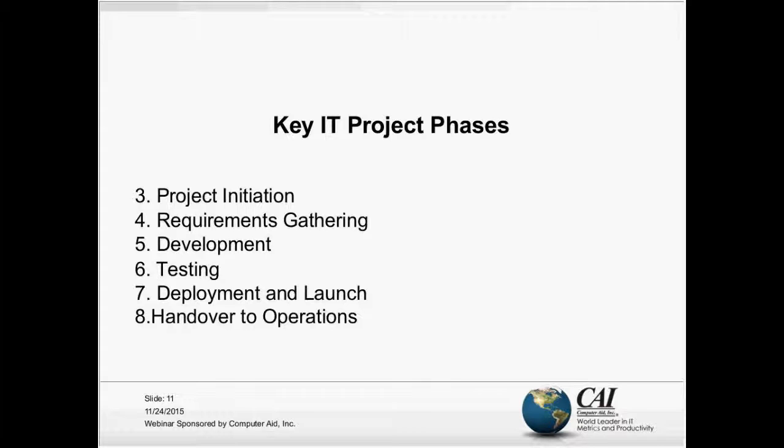This is basically where you've been given the go-ahead to actually deploy the software and actually launch it. And this in itself, if it's a really big program, can actually be almost a project in its own right, depending on how big a deliverable it is that you're actually launching. In one program I actually managed, which was the relaunch of EuroMillions in the UK, it was actually the largest retail launch in 2009. This particular area became, I had 2 project managers just involved with delivering the deployment and the launch. So it can be very big, and a lot of people really just underestimate this.